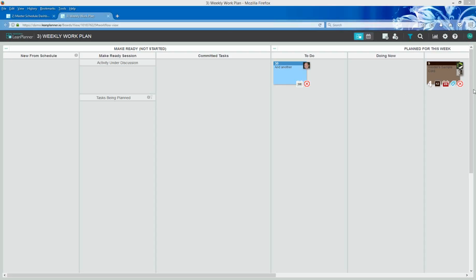Alex, what it's getting at is you don't have to add all the activities that are in P6 or Microsoft Project, but add the high-level milestones, then have the granularity for the 2-week or the 4-week look ahead. That's where you get most value. It's not about getting everything. And if there are certain tasks that could be done within Stantec or within Stahl that are managed efficiently, they needn't come up here. There's a choice here too.